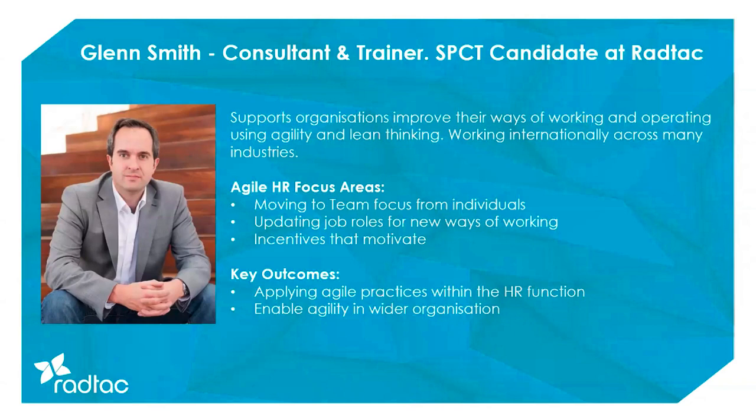As part of this process, we didn't create formal user stories in the format we would expect in IT teams: as a user, I want, so that, and so on. Again, that was limiting how much change they were doing while introducing these new ways of working. But we did get them to think about acceptance criteria. We know that's really important, because it helps us define the scope and implicitly what is out of scope as well. It answers one really important question: when will this thing be done? And when do we know to stop?